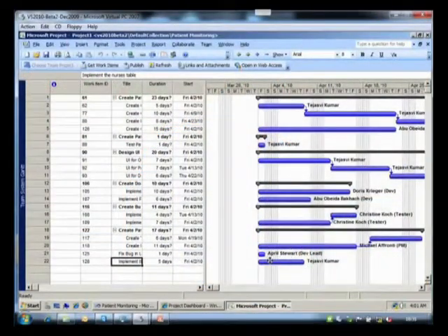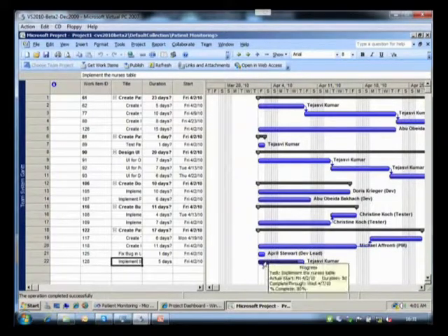So I go into MPP again. When I go back into MPP, right now there's no update here, but if I click on refresh, you actually get to see that update. You get to see here that 80% of the work has got completed, mainly because the total duration was 5 days, and this person has said 32 hours completed, 8 hours still remaining. So it's like 80% complete, right?